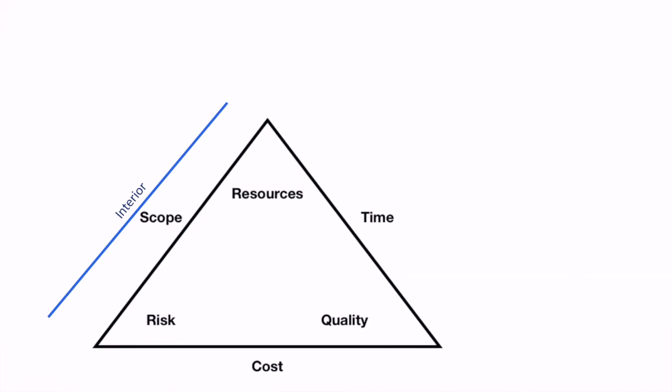And then one day our boss shows up and says, "Hey, let's do that exterior after all. It makes sense to do it all together. Let's just do it." If we drop everything and just do it because our boss asked us to do it, we're going to be in trouble. We're going to run out of time. We're going to run out of money, or in order to stay on schedule and on budget, we're going to cut quality so much we're just going to have a crappy renovation job that's not going to get this $30,000 in revenue and this $10,000 profit that we're shooting for.